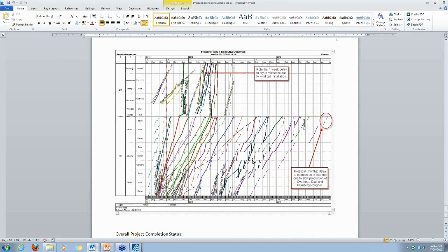And this is the cap to the process. By starting with a review of the CPM analysis, we're able to identify any areas that we perceive risk in the schedule, mitigate those by optimizing, and optimizing not just on our own, but with the project team and with the subcontractors, and getting buy-in to that, and then flipping that over to production control so that we can actually monitor the work and track against the plan to make sure that we are achieving that optimized workflow that we designed.